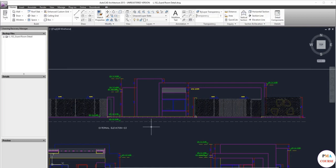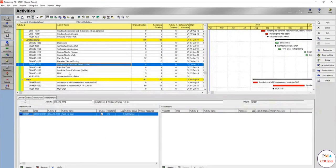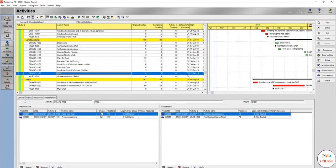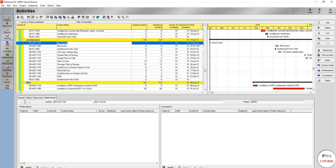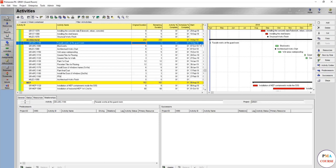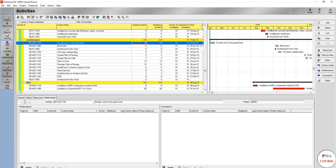This is the most important thing. How do you think we would add the activity here? We could add an activity called facade works at the guard room and give it 10 days. This activity could be okay if it's a very undetailed level one schedule, but it's not okay because these are two different materials and two different subcontractors most probably.